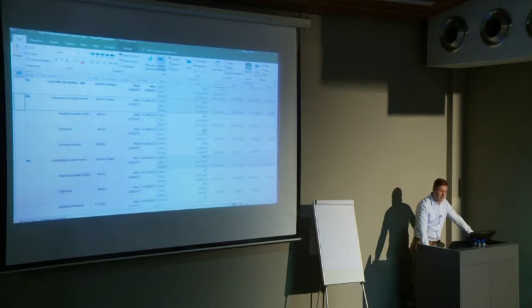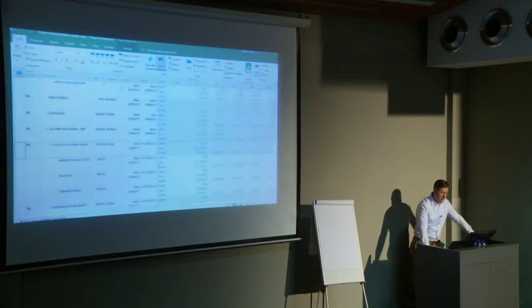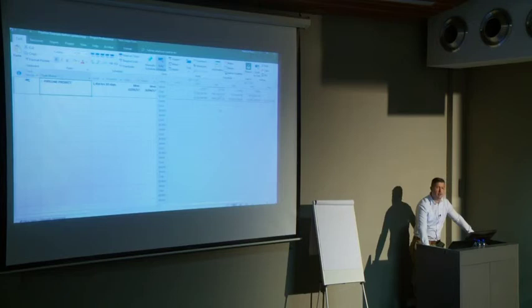Obviously the operator as well. And then those are the costs associated with it in terms of the budget. So those are my planned values. If I roll this up into the highest level, it gives me the project values. And that's where I get those values that I use for my earned value.